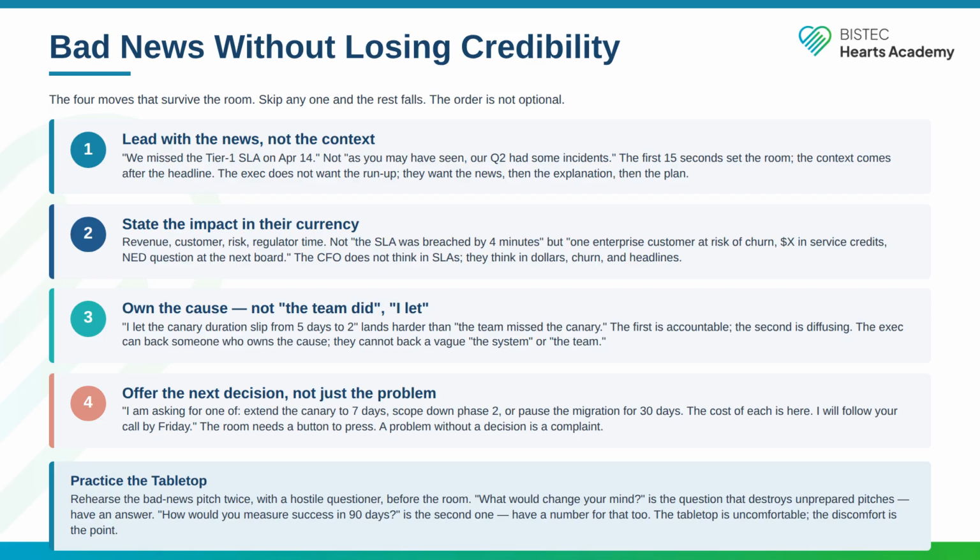Move 4. Offer the next decision, not just the problem. I am asking for one of: extend the canary to 7 days, scope down phase 2, or pause the migration for 30 days. The cost of each is here. I will follow your call by Friday. The room needs a button to press. A problem without a decision is a complaint.